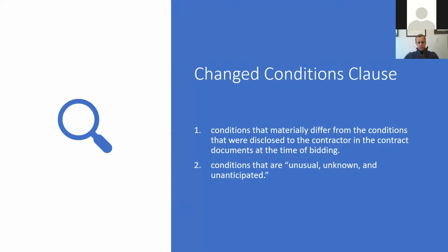If you're talking about a modest residential home renovation, a change condition could be that you take down a wall and you did not reasonably anticipate there being load-bearing beams, and that requires you to engage the services of an engineer, and also perform all sorts of additional work to compensate for the loss of that load-bearing partition. And that wasn't reflected on the drawings or other documents that you were given in order to prepare your bid.